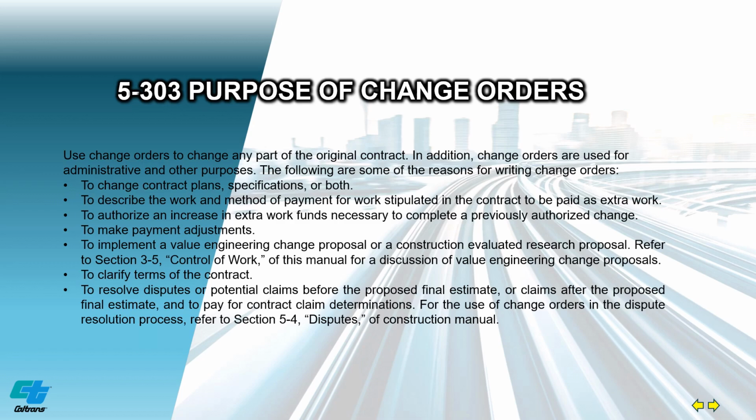To authorize an increase in extra work funds necessary to complete a previously authorized change. To make payment adjustments. To implement a value engineering change proposal. To clarify terms of the contract. To resolve disputes or potential claims before the proposed final estimate, or claims after the proposed final estimate. And to pay for contract claim determinations.